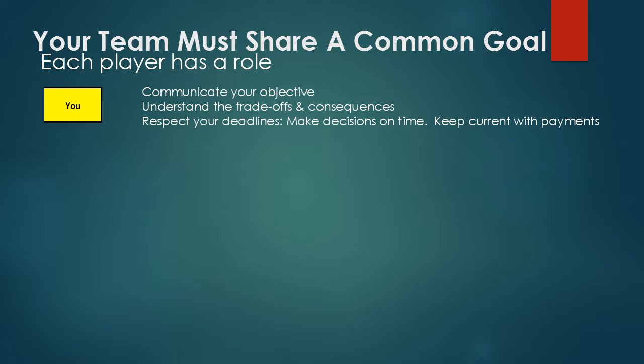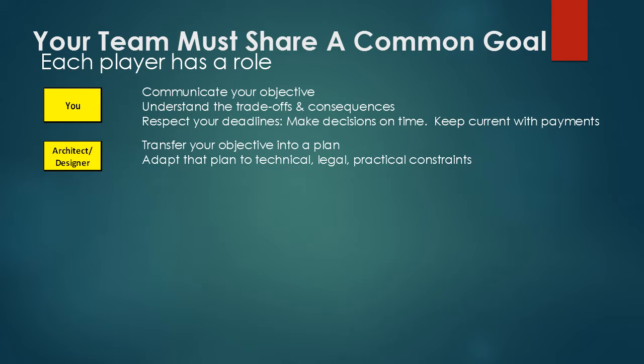If you have an agreed payment schedule, the progress of your project depends on those payments. Funds will very quickly be devoted to obligations to pay sub-trades, staff, or suppliers. If you are late with payments, then everyone on the project will feel the impact very quickly. When that occurs, instead of concentrating on your project, people get apprehensive about what might happen next. We put a lot of the onus on you up to now. The truth is that getting off on the right foot really does depend on you, but we'll get a little easier on you now as we look deeper into what the professionals contribute to your project.